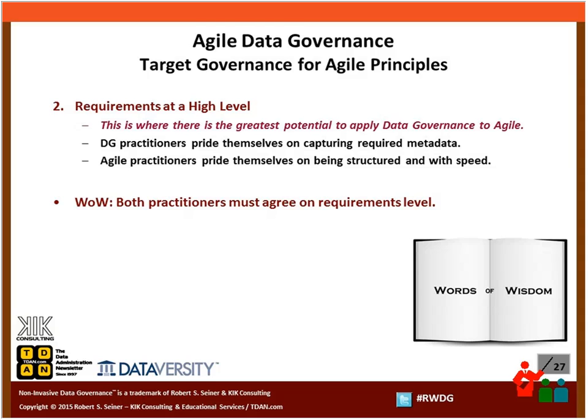On the agile side, folks delivering agile projects pride themselves on being structured and delivering things quickly. One of the words of wisdom I want to share: we've got to get practitioners from both sides — from data governance, from data management, and from the agile delivery side — to agree on a certain level of requirements. If we can do that, that's another way of applying governance to your agile delivery method. We want to get them in the same room to agree what level of detail of requirements we're going to need to move the project forward.